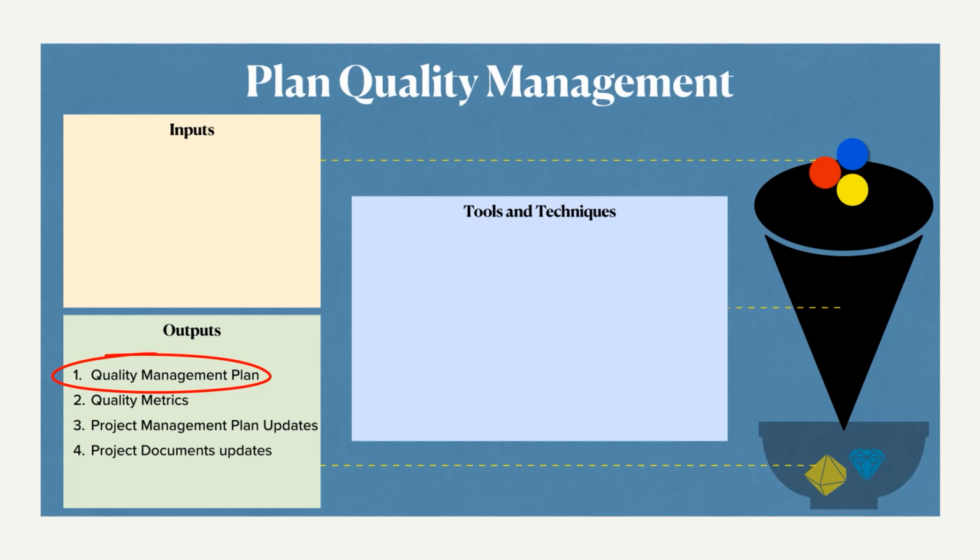So what are we doing here? Through this process, we create a quality management plan which could contain objectives, roles and responsibilities of the people, the processes identified for each deliverable, the controlling plan, and controlling tools, what kind of tools we are going to use to control the quality of a product. Don't worry so much about the format. The format is organization specific. Just know that these things can be added to this format. Even if you find a different format in your own organization, which might not have the components I just mentioned, project management doesn't limit you from using any additional components. But these things can be part of it.